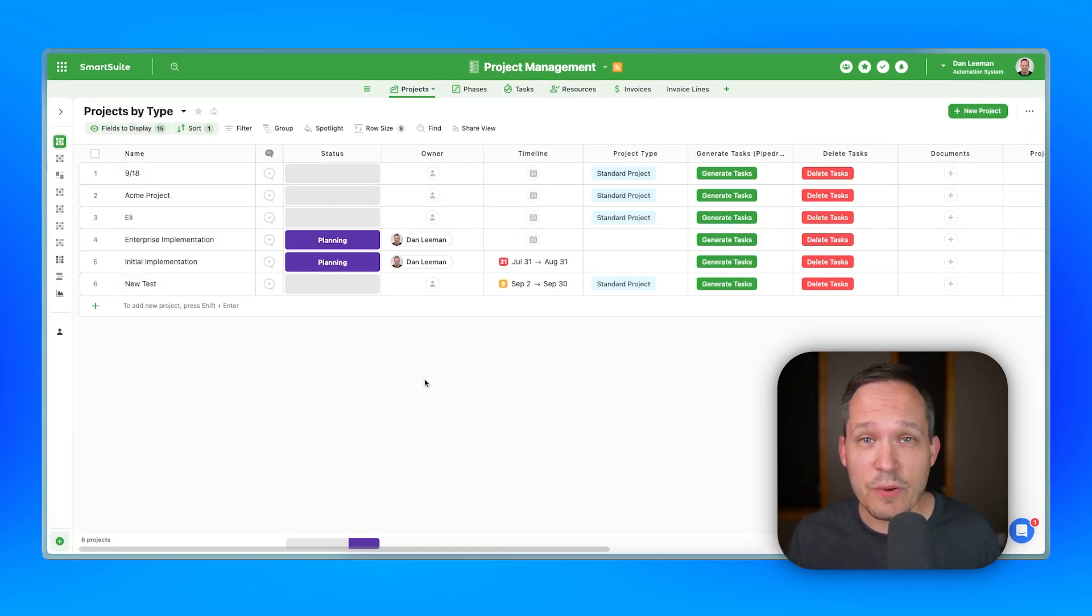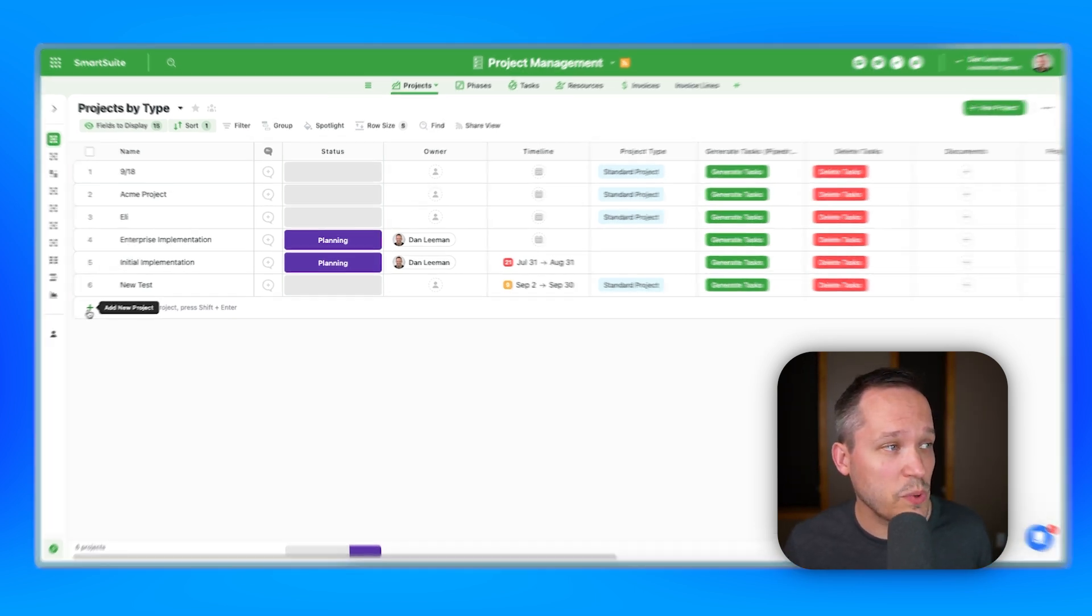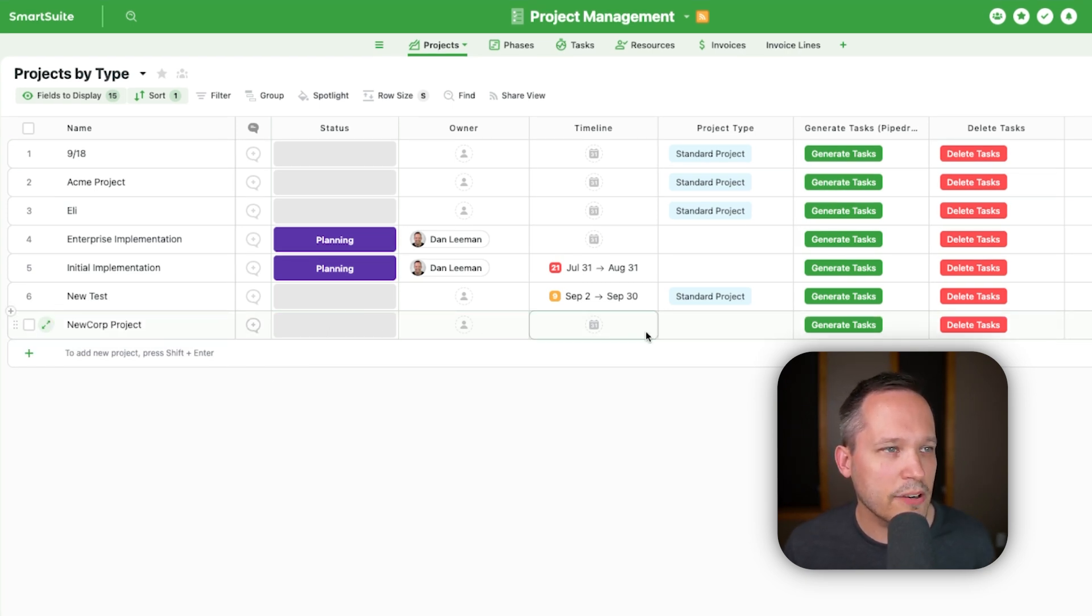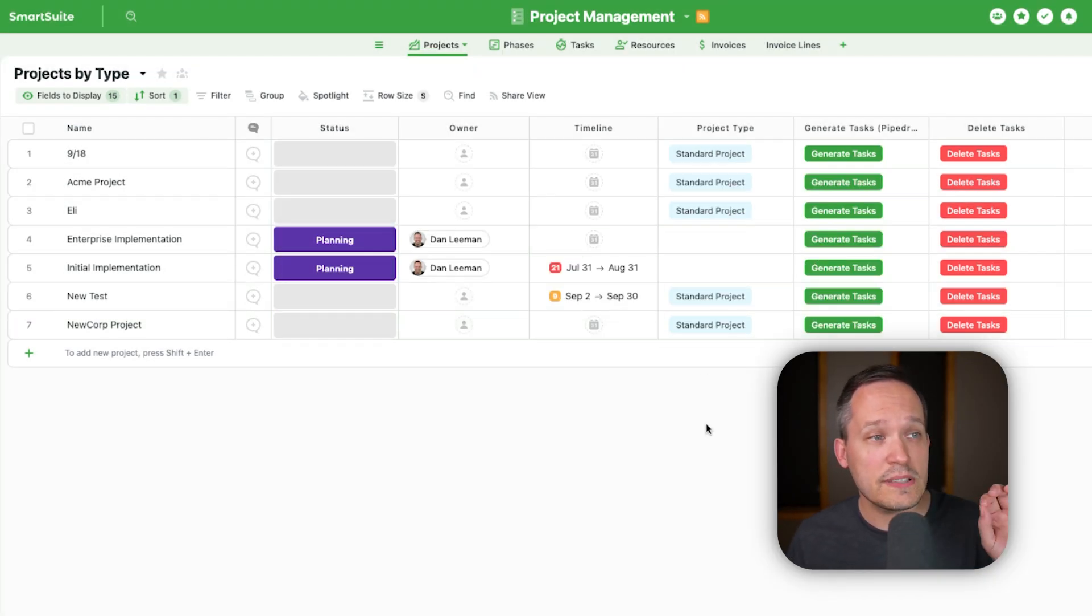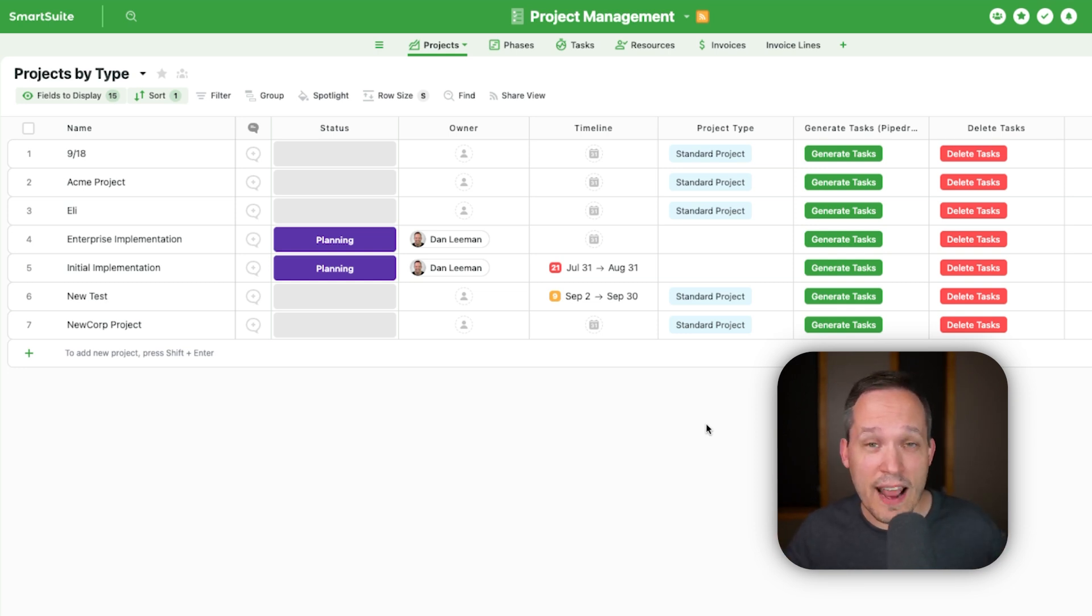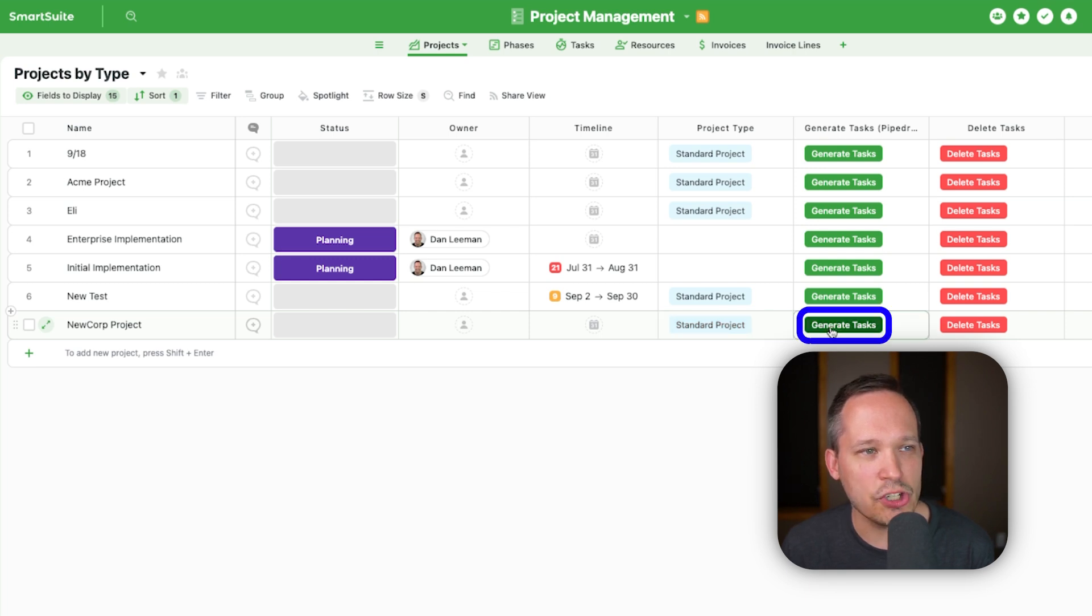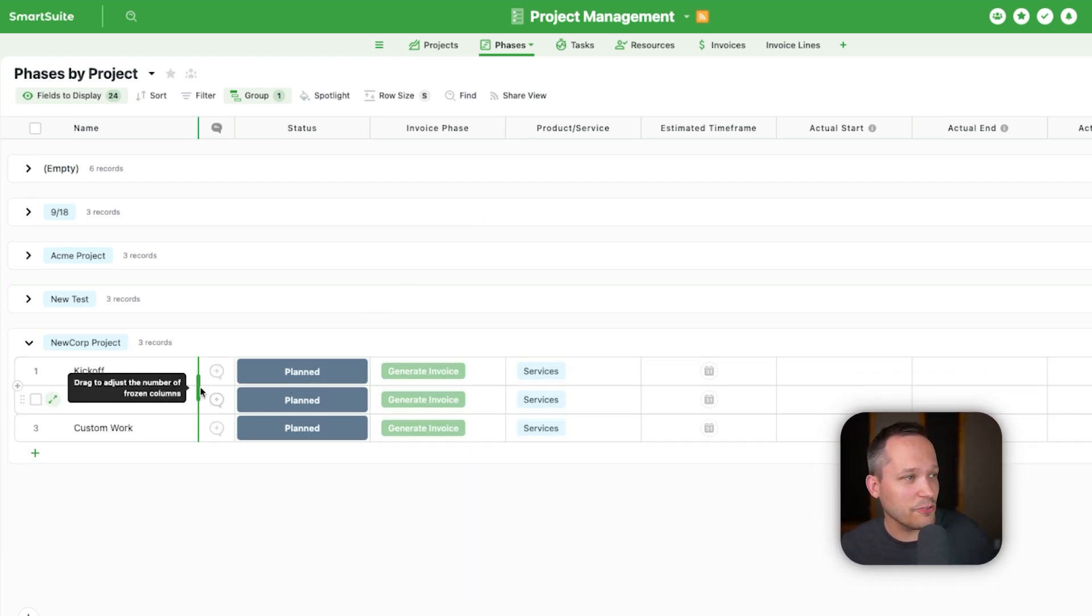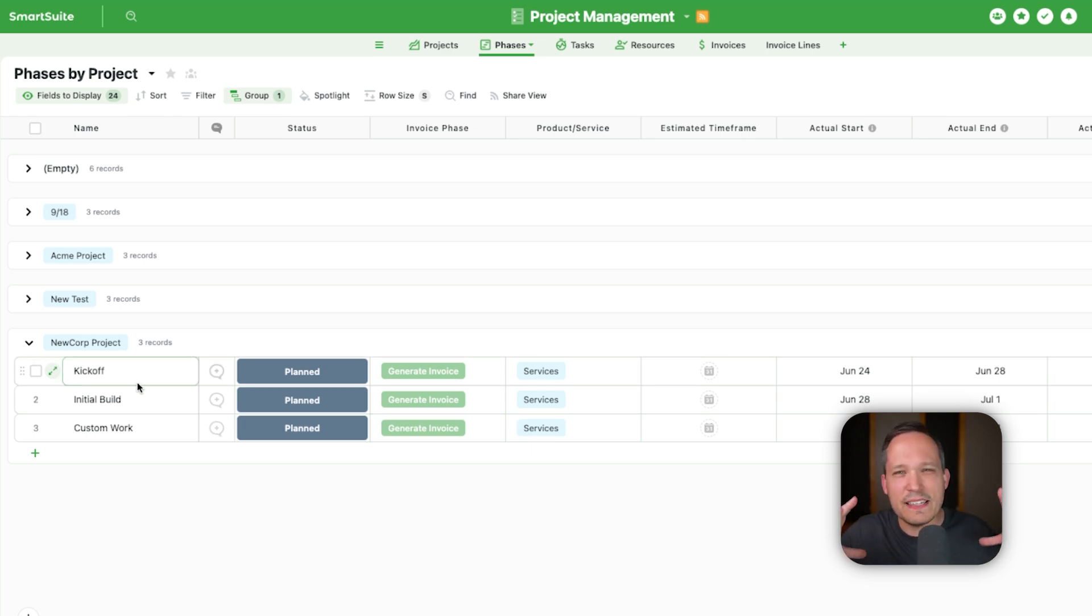So now we've had this customer sign and we could have it automatically create a new project for them as soon as they become a customer. But maybe we have different project types and we want to do it ourselves. So let's create our own project here. And I'll just call this new corp project. The other fields don't really matter here too much. But the important part is that we want to set a project type because we've built out project templating. So now if you have different milestones and tasks and custom fields, rather than having to duplicate this, which isn't going to manage the dependencies very well if you have dependencies like you'd see on a Gantt chart, you want to make sure that you have an actual templating engine behind this. And so to do this we've built this out. So we said here's a standard project, now let's go ahead and generate the tasks.